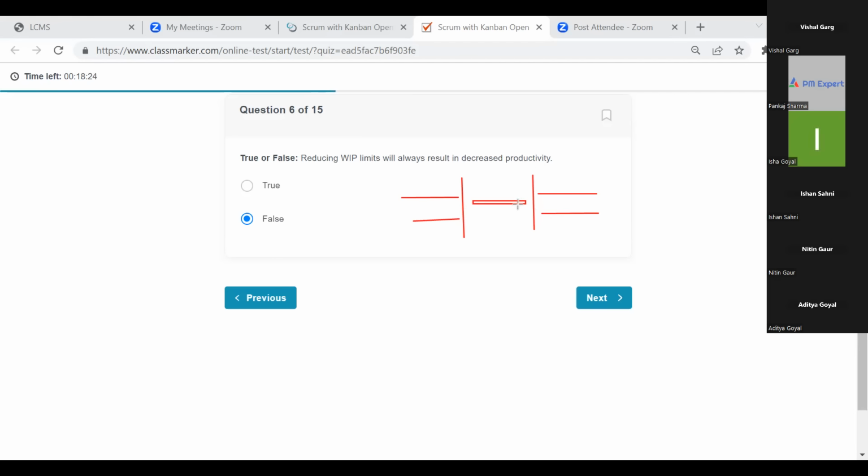So this is how you maintain WIP in Kanban also, just like traffic signal duration. You have to balance the flow from left to right. Now, there should always be optimum WIP limits. Too low a WIP limit is bad, and too high is also bad. Too high will lead to delays and other issues. Too low will lead to underutilization.